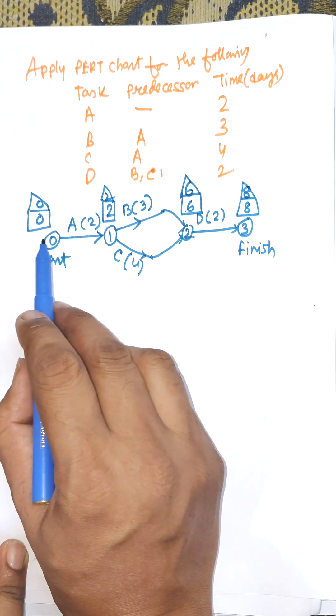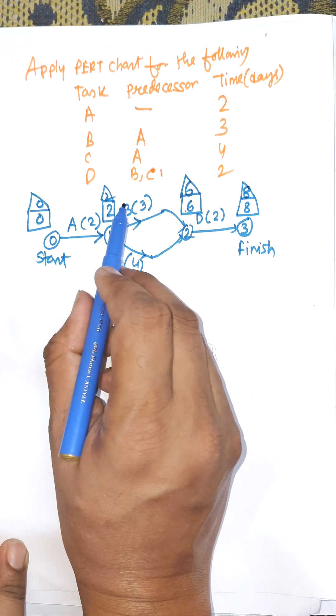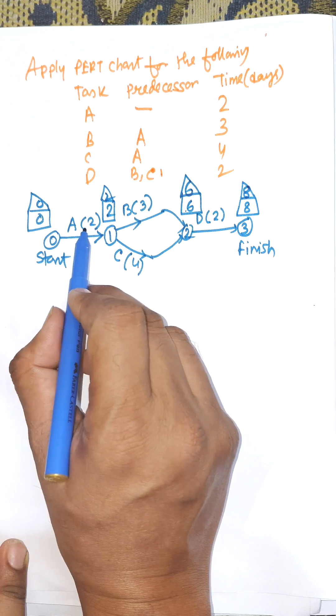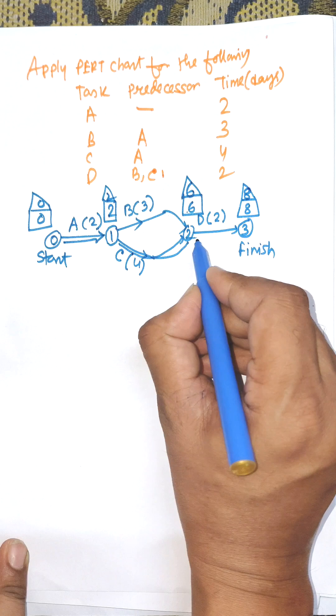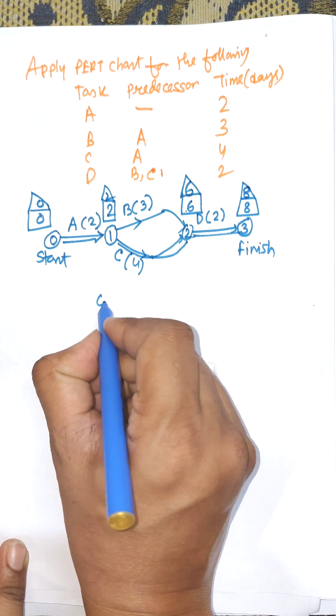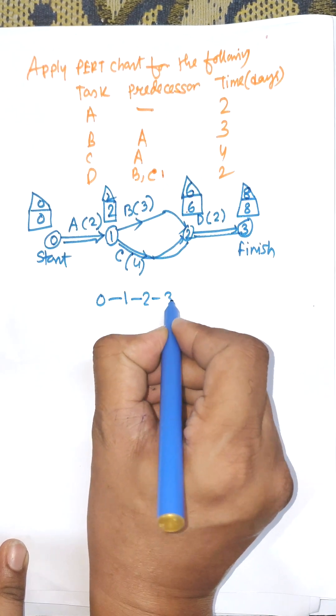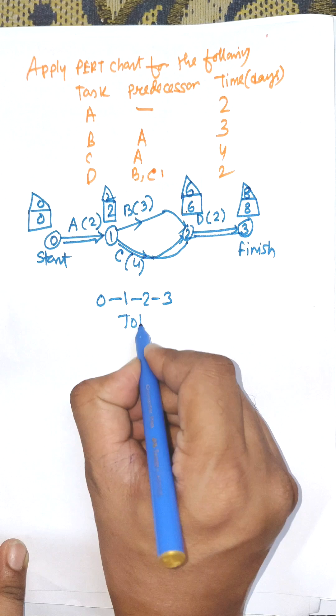The critical path is total duration that is 8. We need to consider 2 plus 4 plus 2, that means 0 to 1, 1 to 2, and 2 to 3. So 0 to 1, 1 to 2, 2 to 3 is known as critical path. Total duration is 8.